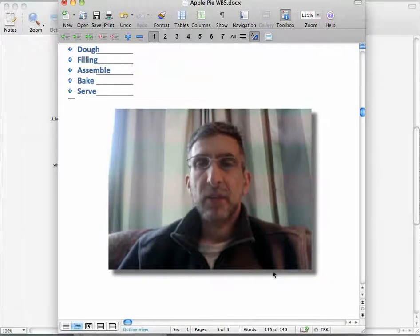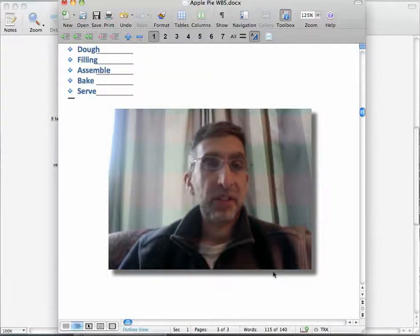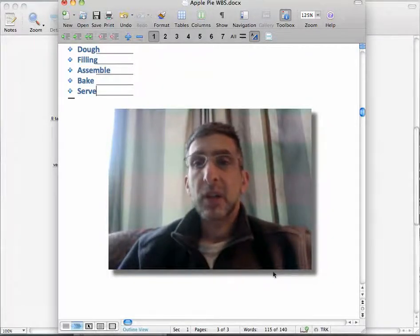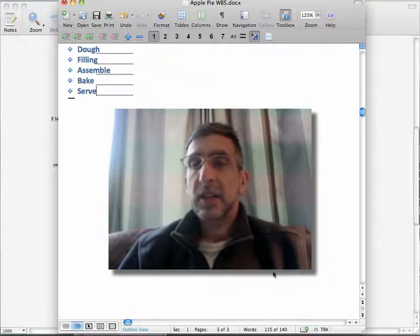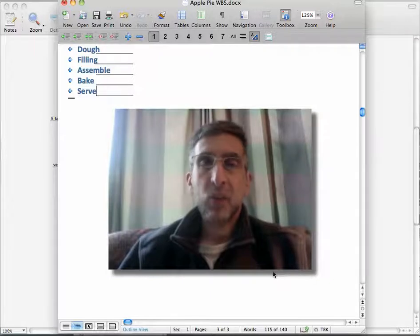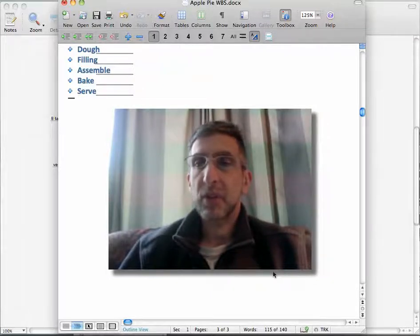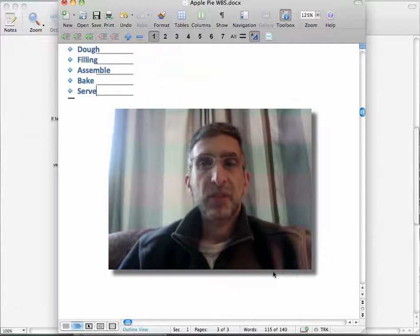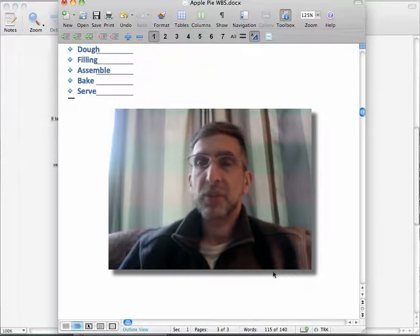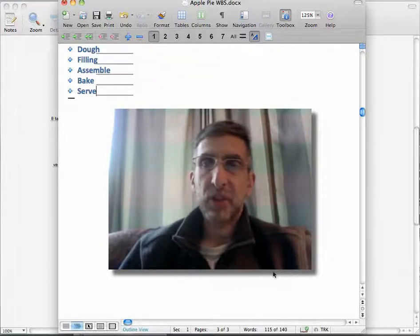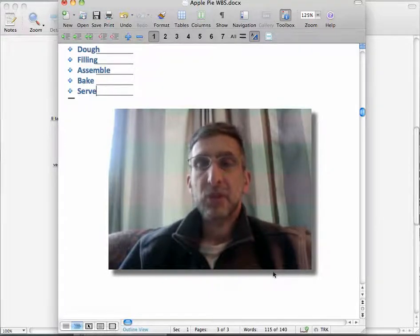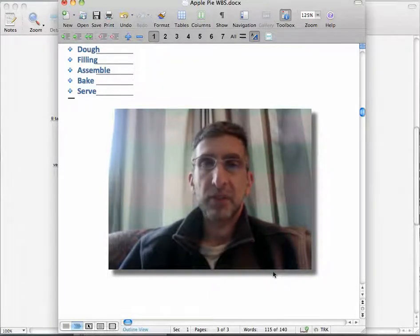By creating the WBS, you determine the specific tasks you have to do. It provides an order for the events that have to occur. It reveals dependencies on one task for another. It helps determine the schedule later on, the actual amount of hours you're going to spend on your project, and based on those two things, you finally determine a budget.